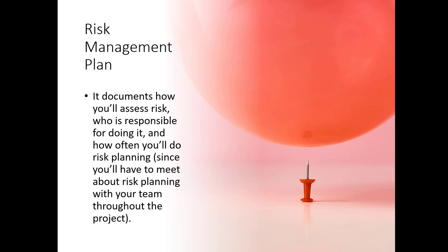Some risks are technical, like a component that might turn out to be difficult to use. Others are external, like changes in the market, or even problems with the weather. It's important to come up with guidelines to help you figure out how big a risk's potential impact could be. The impact tells you how much damage the risk would cause to your project. Many projects classify impact on a scale from minimal to severe, or even from very low to very high. Your risk management plan should give you a scale to help figure out the probability of the risk. Some risks are very likely, others are not.